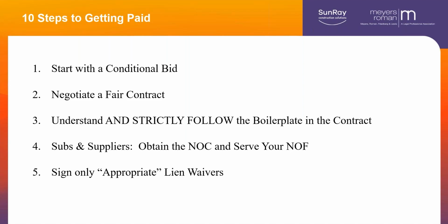In Ohio, they're called notices of commencement. In Florida, they're called notices to owner. It's the document that's filed by the project owner to tell you everything you want to know about filing a lien: who the project owner is, who the contractor is, who the lender is, if there's a bond on it, and the legal description, which if you're going to file a lien is vital.